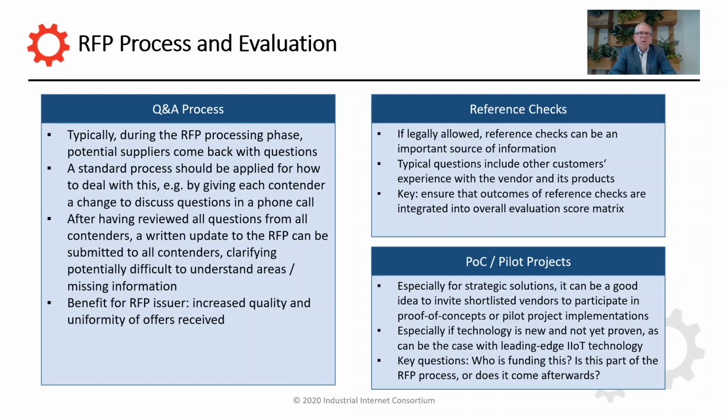In the interest of a transparent and fair process, it's really good practice to collect the different questions from the different vendors and then get back to everybody who has applied with the same document, which is basically a consolidated version of questions and answers that address any inconsistencies or smaller holes that you found in the RFP document. Once this is done, once you start receiving offers, there are some additional tasks that typically are done.